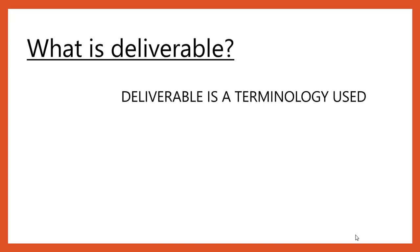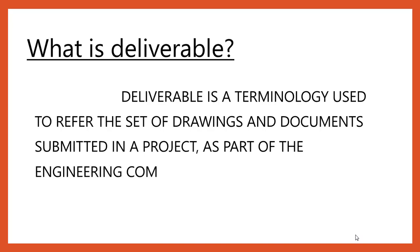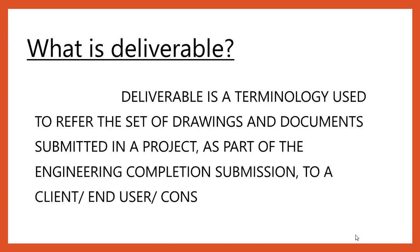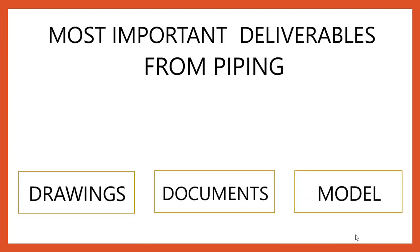Let's understand what is a Deliverable. Deliverable is a terminology used to refer to a set of drawings and documents submitted in a project as a part of engineering completion submission to a client, end user, or a consultant. If you are working in a project, you must be working for a client, and as a part of engineering completion, you must be submitting something. This submission includes drawings and documents that are known as deliverables — the final engineering packages.